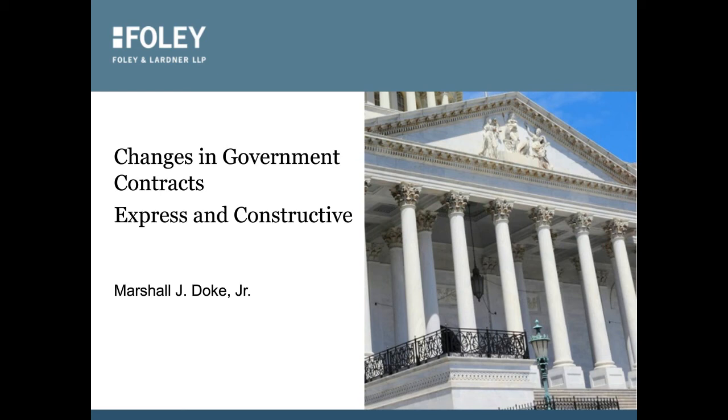Failure to cooperate is another area of constructive change. The government may have a duty to take affirmative action to assist the contractor. Many government technical people and contract administrators don't understand that they have a duty to do that, to assist the contractor when they can. Even the government's mere silence may be deemed a failure to cooperate. It may be a constructive change if the government fails to respond to a contractor's request for information.